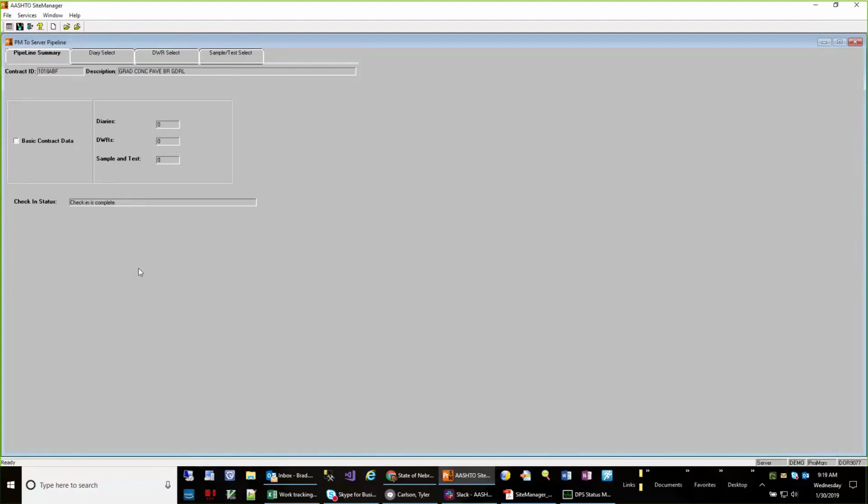Hey, Brad? Yeah. Have you noticed when you're doing samples out in the field that some of the things you may not be able to finish, like some of the tests may not be available to fill out until you get hooked onto the server? Yep, that is correct. There are some templates that they just don't have access to all of the data that's available. We weren't able to transfer it all out because it's a lot of information. Some of it needs reference data in order to fill out the templates. So for those, you can assign the test, but you can't actually fill out the details of it until it's back in on the server.